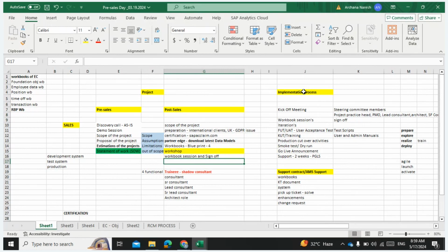All right. So yes, very good question to ask. In the SuccessFactors process, you're going to highlight to your manager that, boss, they are saying they have 78,000 records and they need 25 years of historical data, and that's not highlighted in any of your scope document. Because usually what happens, if it's not highlighted in the scope document, we only load the live data. If currently they have 100 employees, we only load the 100 employees. We are not responsible for the historical load.